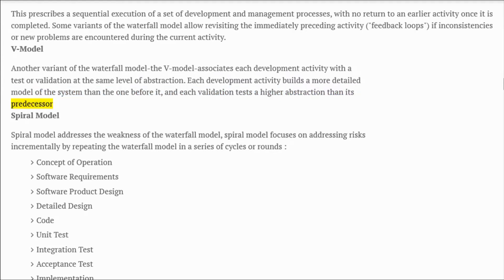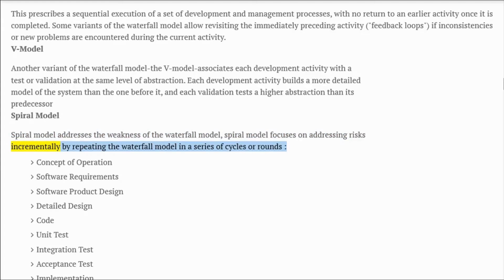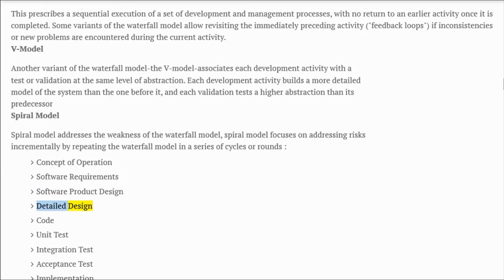Spiral model: addresses the weakness of the waterfall model. The spiral model focuses on addressing risks incrementally by repeating the waterfall model in a series of cycles or rounds. Phases include concept of operation, software requirements, software product design, and detailed design.